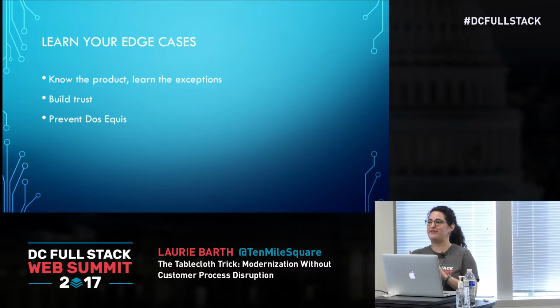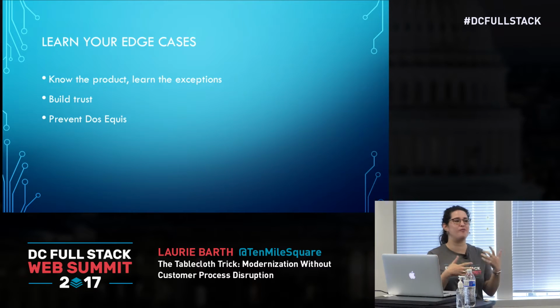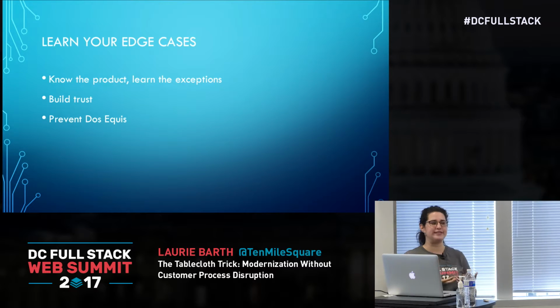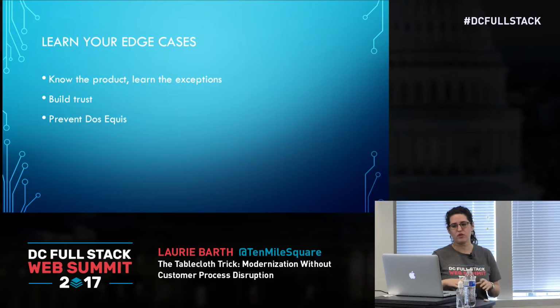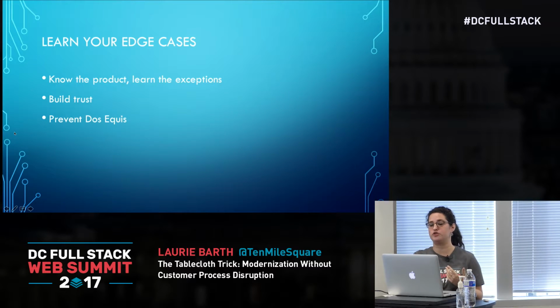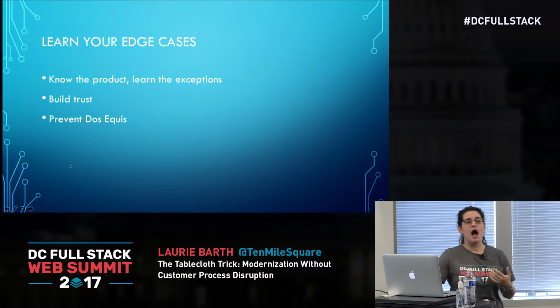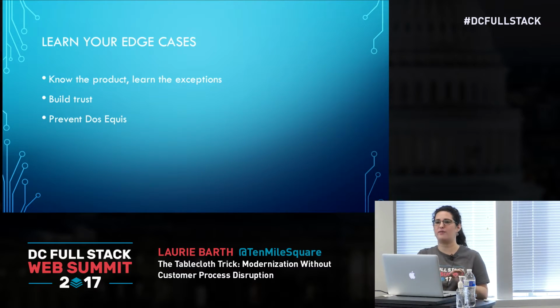And one other really big thing happened. The users forgot or remembered what they forgot to tell the developers. They forgot to tell them this edge case or that edge case. And that happened dozens, I'd guess hundreds of times, but the users weren't part of the conversation anymore, and that was a problem. Learning your product as well as your users know it is really critical. You'll earn their trust, but you'll also trust yourself to build it if the users aren't in the room with you. Agile and incremental requirements are your friend as much as you can enforce them in the federal space.